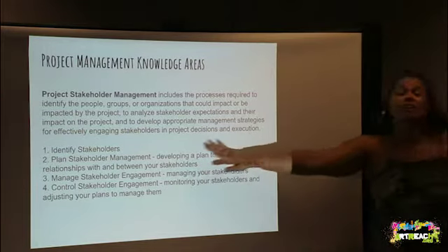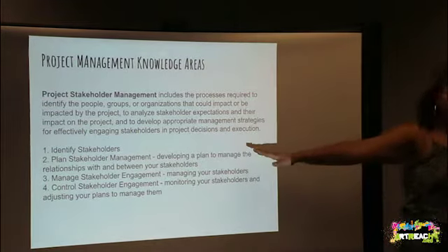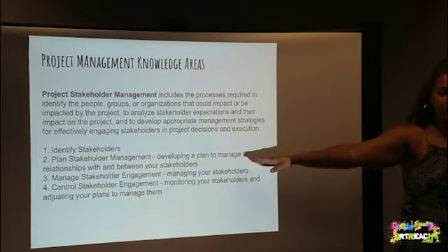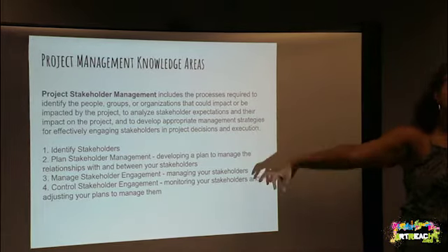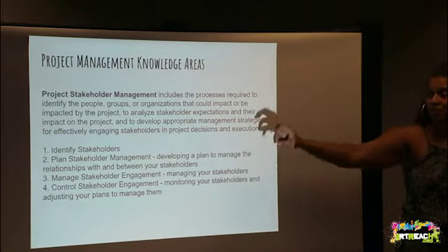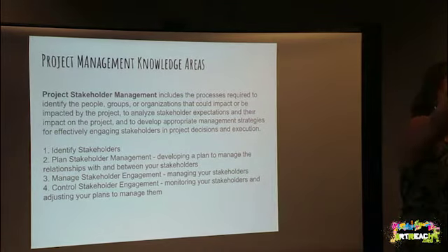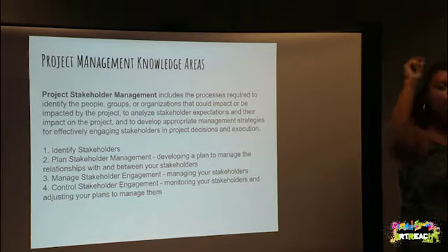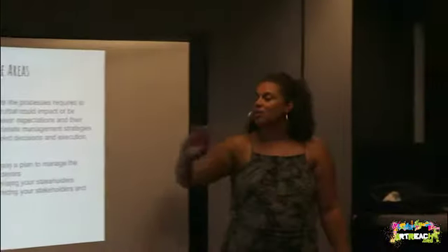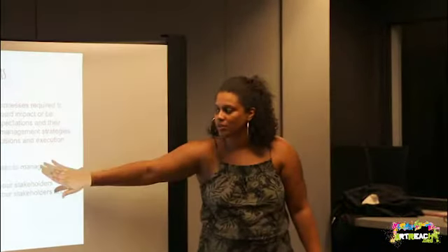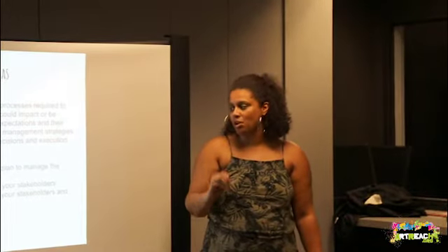First of all, you need to identify your stakeholders. Because if you don't think you have stakeholders, you have not done the work. There are stakeholders in every project, even from the startups. If you're starting up and you have a project, you're like, all right, who's bringing me the money? Who's connecting me? Who is this project going to impact? Who's my audience? Because they're stakeholders, right? You have to identify those stakeholders before you can plan how to manage them.